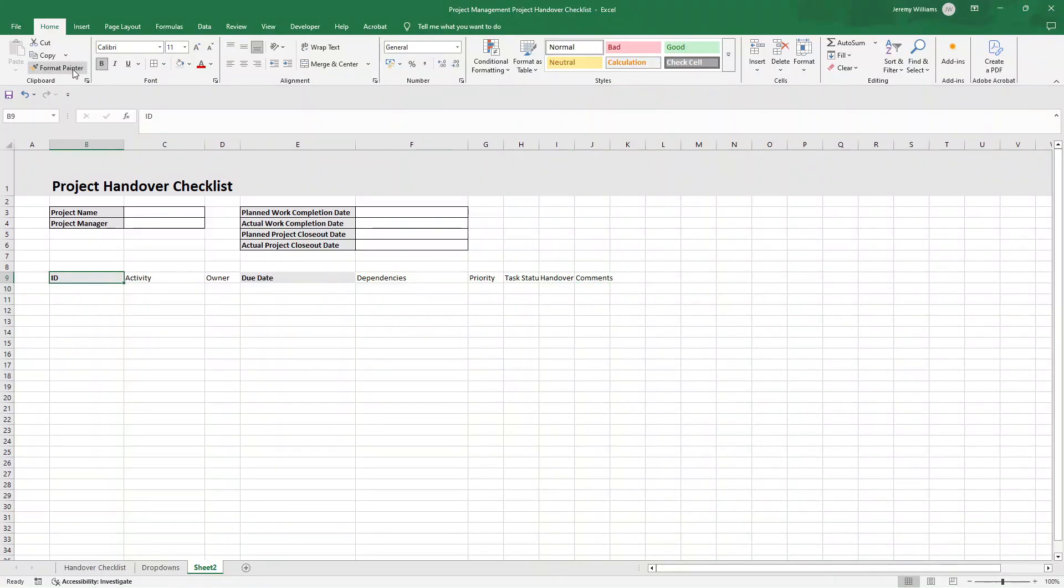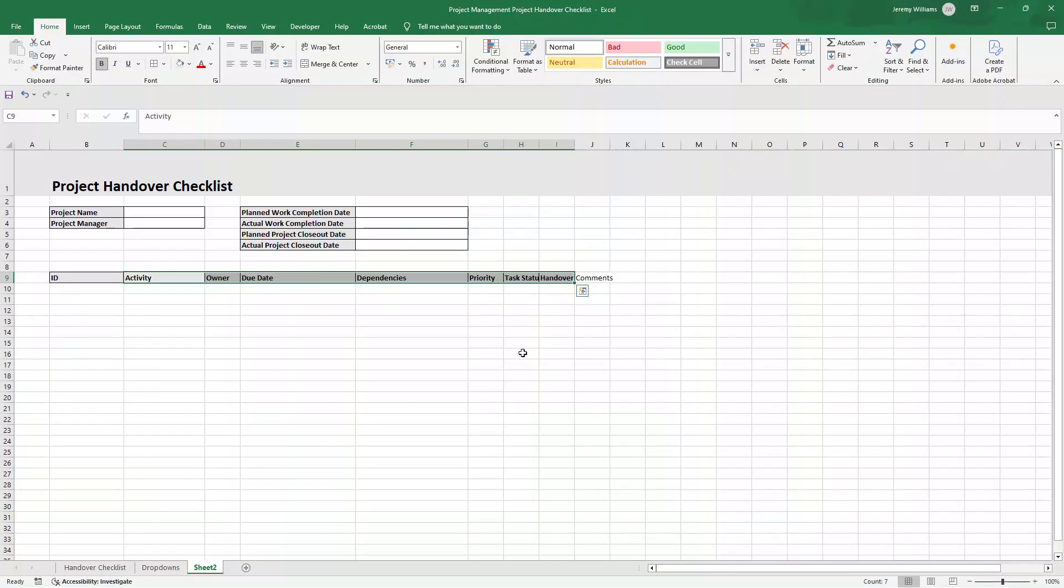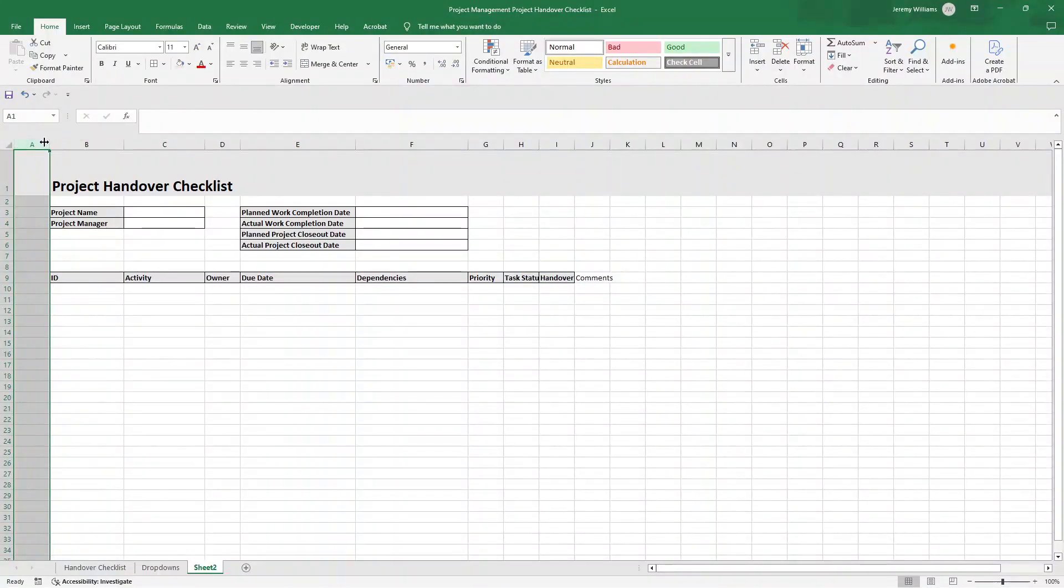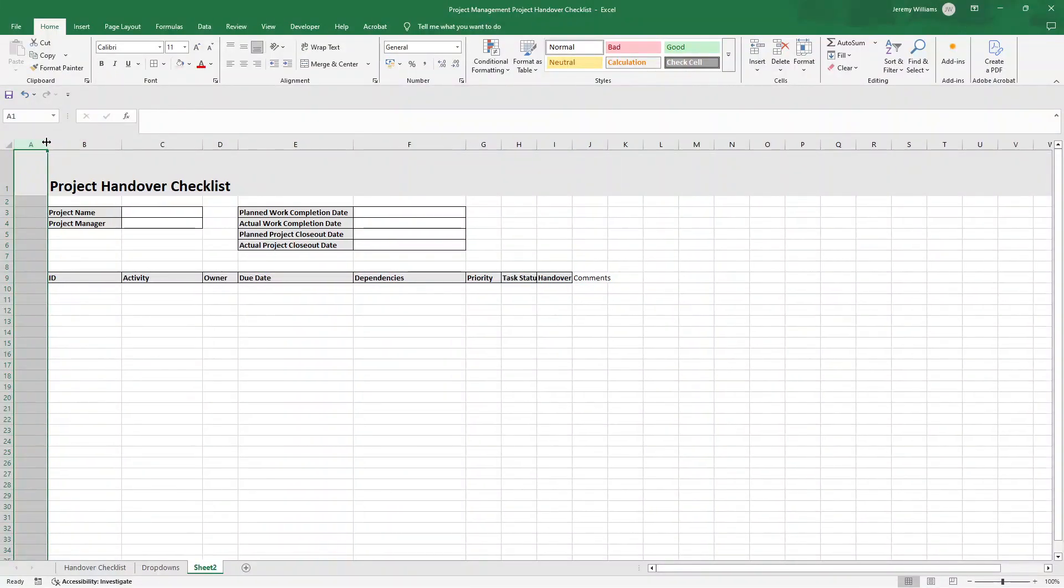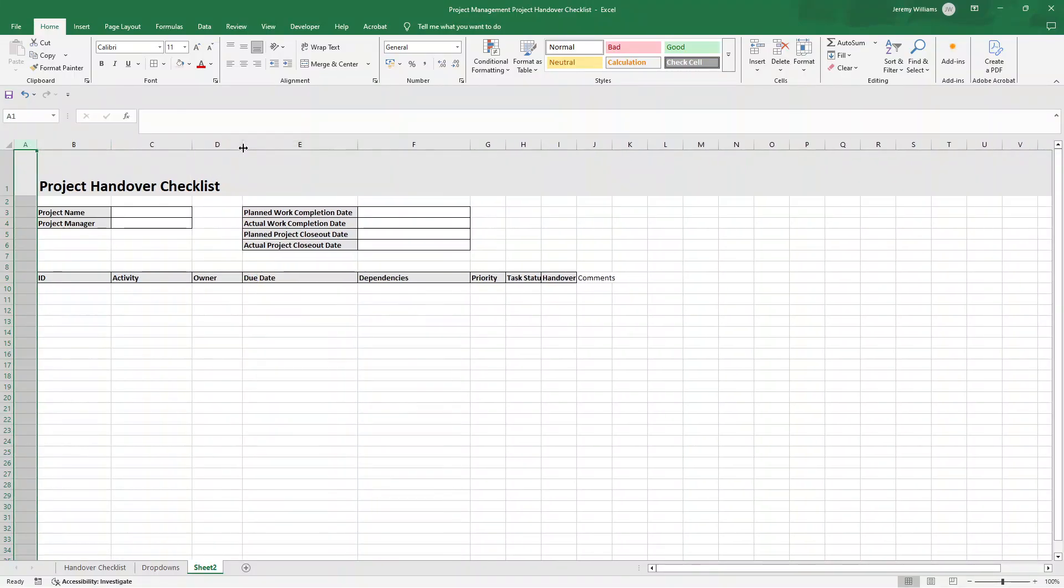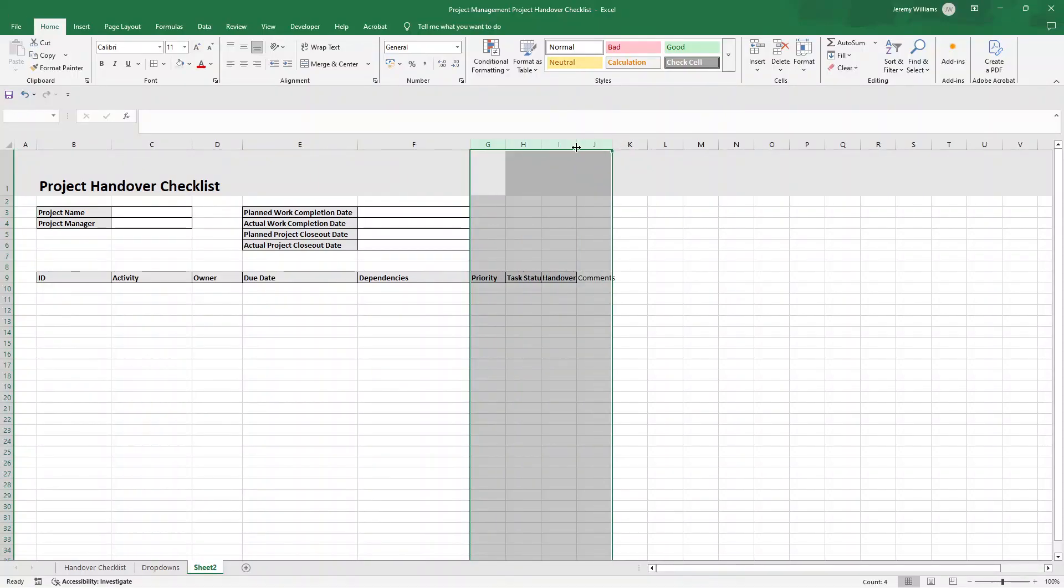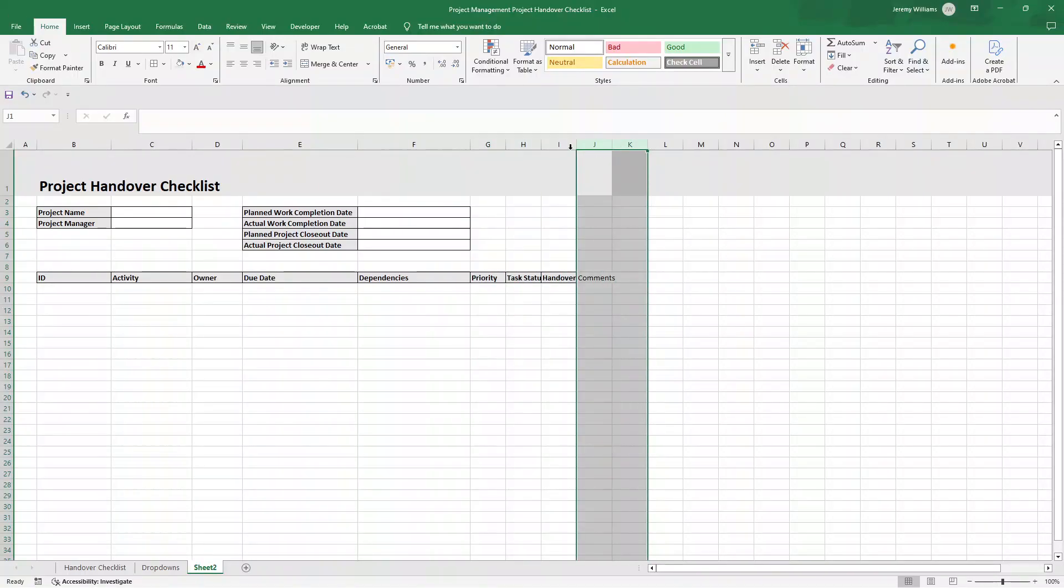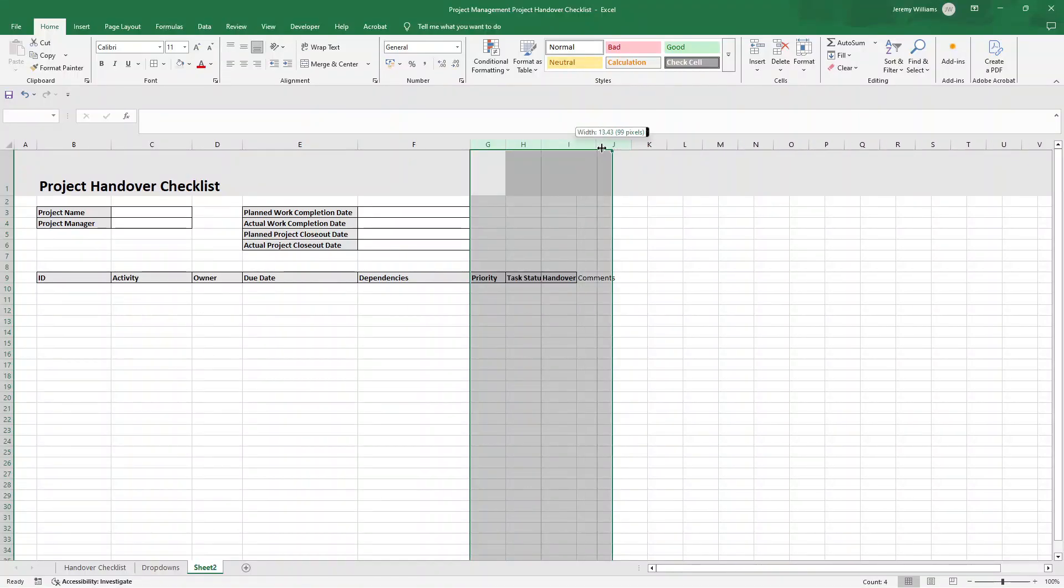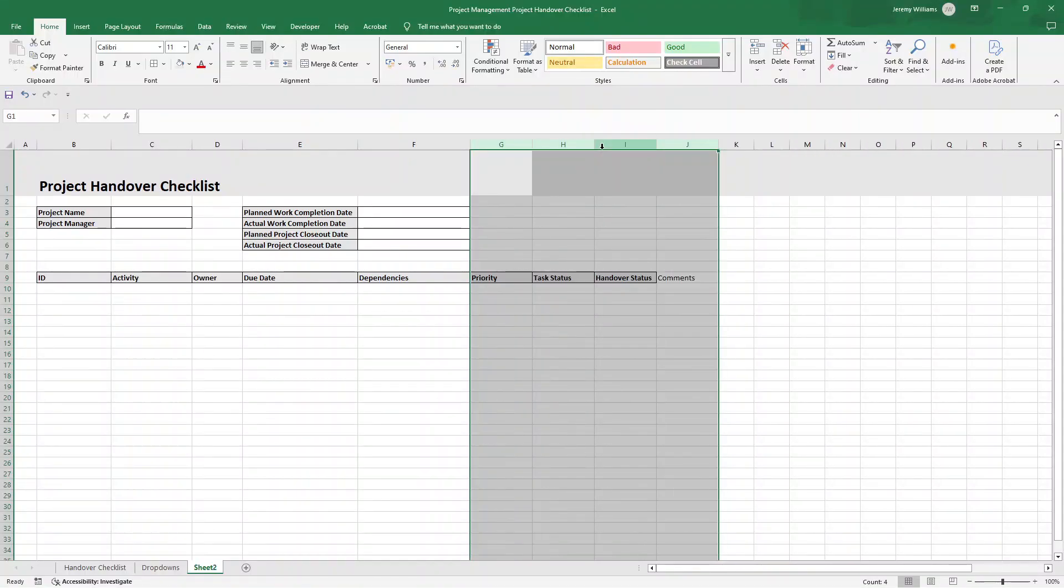Now this one's optional, but if there's any dependencies, so for instance, it may be that some activities cannot take place until the previous one is done. This will just enable us to specify that. We are then going to have priority, and we'll set this up as a dropdown. We are then going to have task status, then we're going to have handover status, and then comments.